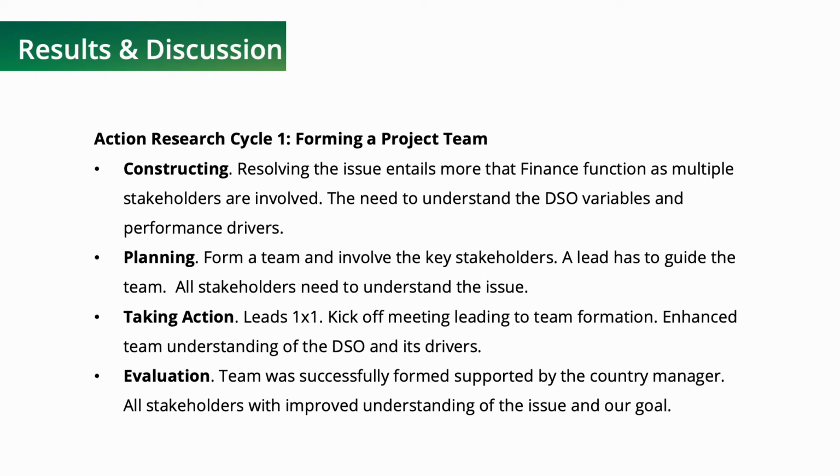Going into the action phase, I initiated one-on-ones with the finance lead, and it gave me a good understanding of the current performance, how the DSO formula works, and the key variables. After which, I arranged a kickoff meeting inviting the key stakeholders. I highlighted to everyone the mandate and support of the new country manager. I presented the current DSO numbers and discussed the key variables and processes that drive the DSO performance. Similarly, I highlighted the ultimate goal of the team, which is to achieve a DSO performance of 95 days or less. During this meeting, the commitment from the key stakeholders was obtained.